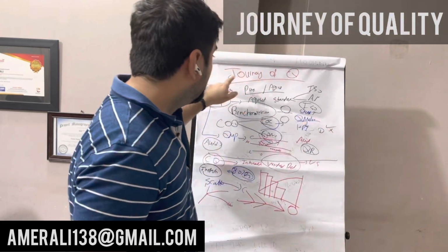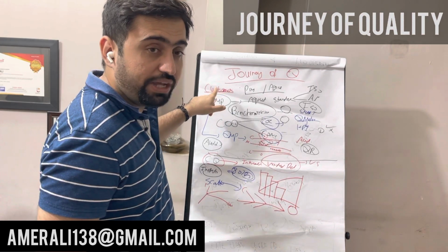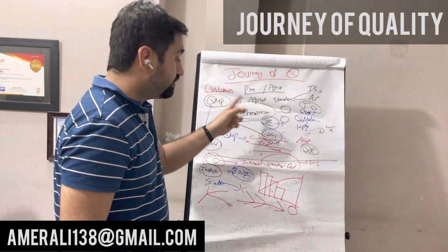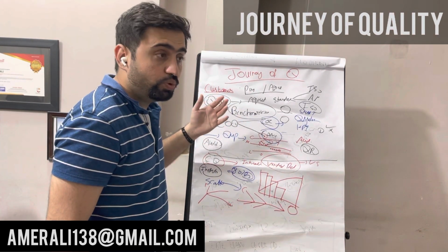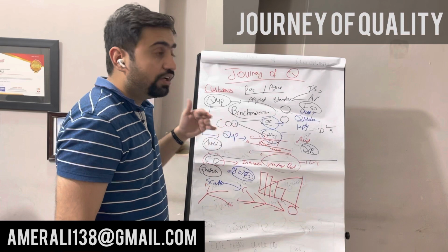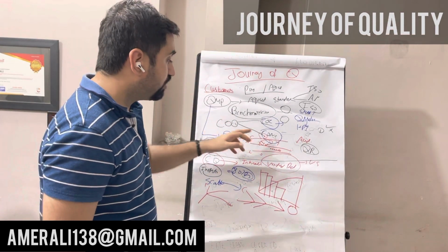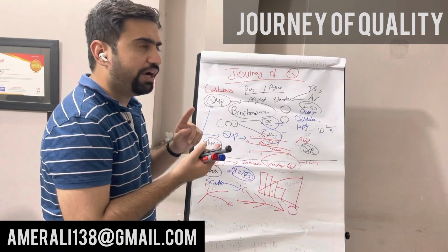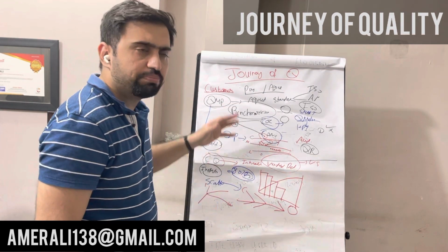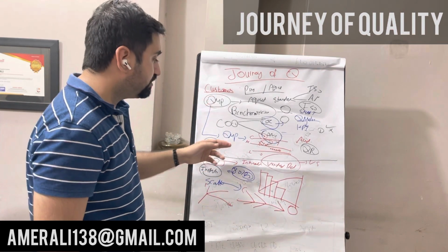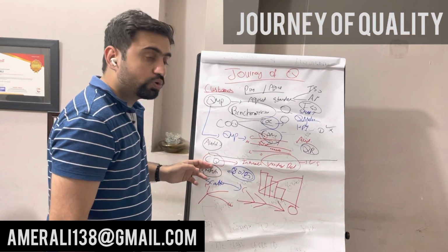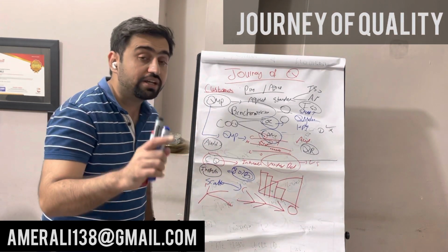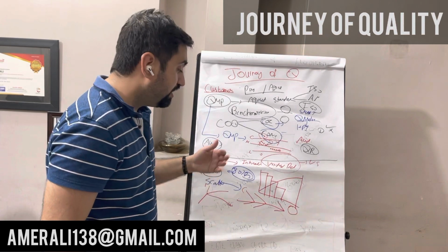So again, plan quality: make a quality management plan and quality metrics using cost of quality and benchmarking. Then in manage quality, we use audit as a major tool. We use checklists, control charts, scatter diagrams, check sheets, Pareto, fishbone diagram. They can be used in manage as well as control. Once you get quality reports there, it comes to control quality. Here the deliverables are verified by inspection and all of those tools.